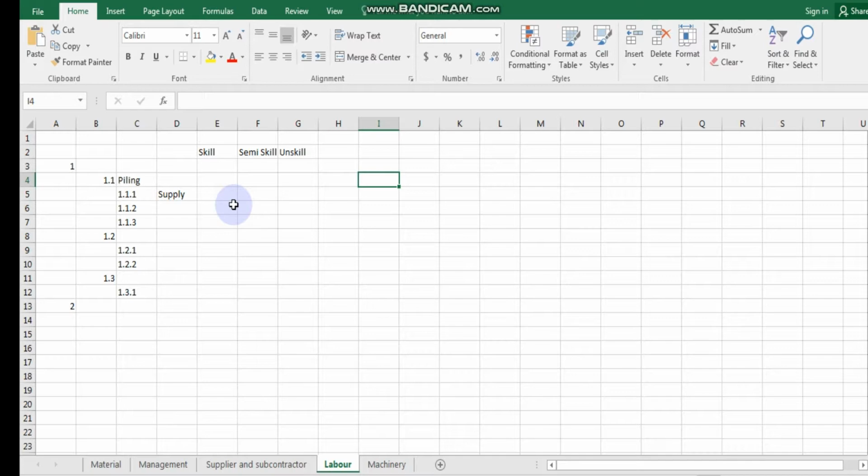If you only have one carpenter for the project and you need two here, then you will need to highlight that particular point, and either you have to lengthen your time, meaning that your time has to be longer because you've only got one, or you have to bring in extra resources from the company to do the job, and that will be requesting a bit more money. But it's the same, because either you use more time or you use more money. So which is more important, time or money? These are the questions that we really have to learn to answer as we go along in project management.